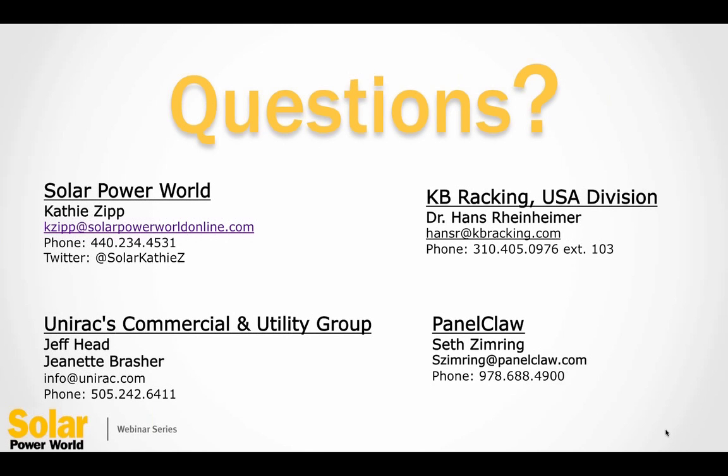All right. Can I just add on for a second? I think we have seen substantial declines in total racking costs, both in terms of the capital investment as well as installation times and some of the other associated costs over the last, let's call it 4 years. And when you look at the module declines, they're astronomical. But I think you've seen racking declines of maybe 50% over the all-in cost over that period.